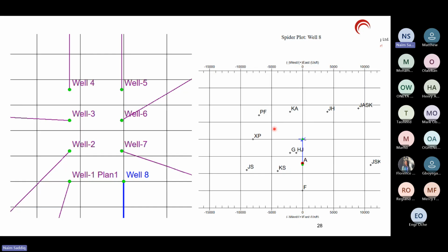To optimize it, you will say, can I move some targets closer? Is that okay? Can I move? Okay, are these kinds of spaces allowed for the pad location? Can I have my pad moved here in the planning phase, of course? So you can actually ask this question, which areas you can do, which targets you can move. The goal is to bring them tightly together and bring your pad in the way that all the wells become shorter when it comes to drilling.